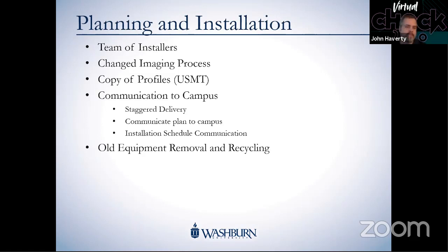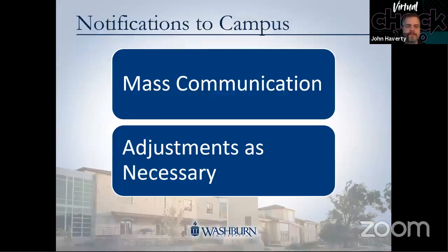All of this was going on, new computers coming in, and the installers had to make time to take all that old equipment down. It wasn't handy because they were semis, so we couldn't just put them out back of Henderson. They had to schedule time to take those down to the bin or to the semis, so we could dispose of those systems, get them off the dock, and get ready for the next delivery of systems. So it was a constantly ongoing cycle clear up until the last delivery in March, getting ready for the final delivery to come in.